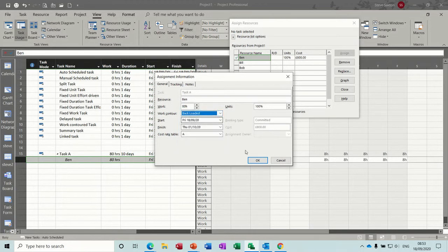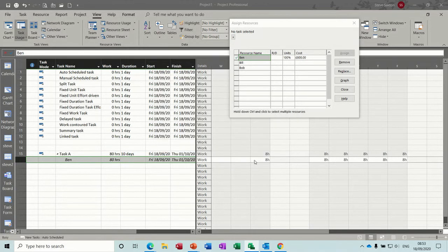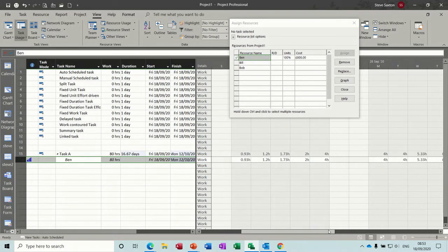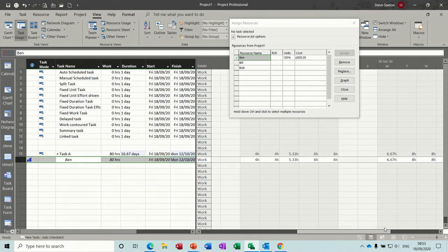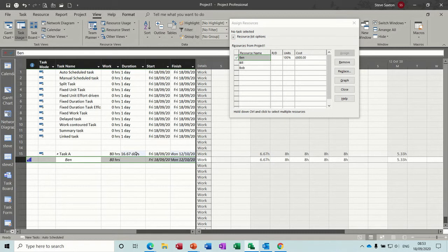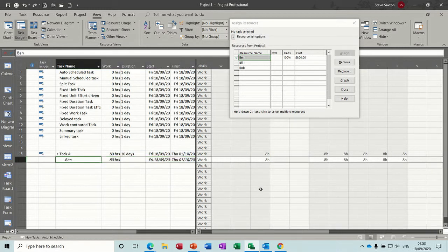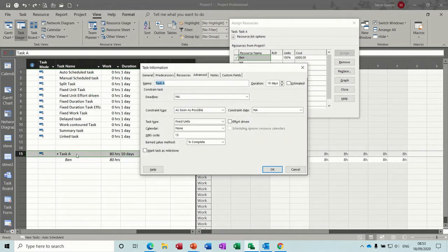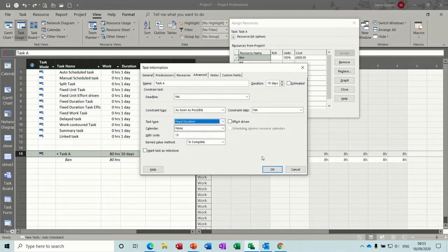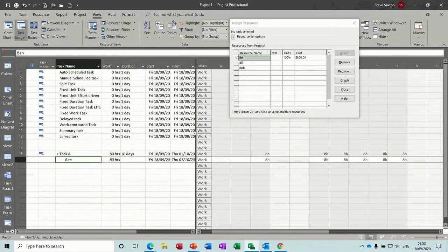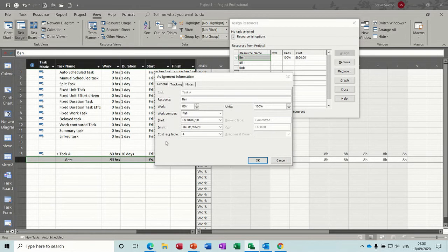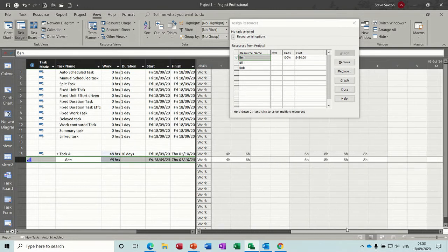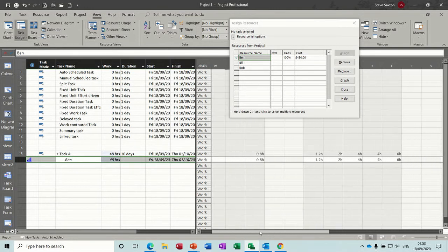So I'll select backloaded, and then click OK. So it now starts off with minimal work, and then increases like so. But what it's done, and what I don't like, is this ten day task has now become more than sixteen and a half days. So if I just don't do that, what I tend to do is double click on task A, make it a fixed duration, so it's fixed at ten days, and then apply the work contour, and it will do it within the ten day fixed duration. The hours will now reduce quite a lot, but you've still got it within a ten day period.